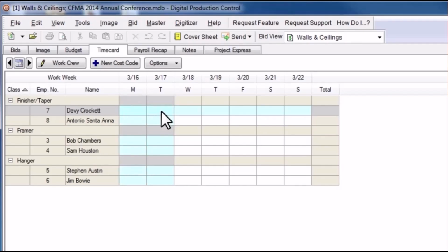Keep in mind that if you adopt this method of tracking hours worked, the production graph may not show the correct daily production depending on how you have chosen to track the percentage of work completed. However, the overall progress of the project will be correct.